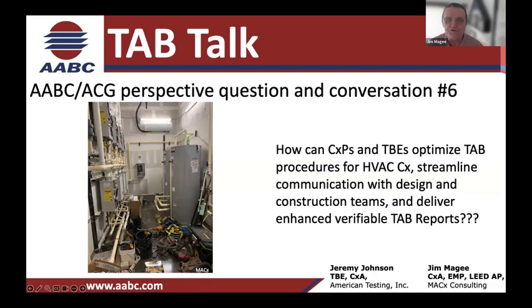So I don't know how you survive any kind of sizable project without some type of software management of what you're doing, both your field report and your status on jobs. Like in data center commissioning, we want a tracking system where things are tagged, both on hardware, physical equipment, as well as in the software in the spreadsheets, and then they're color coded. A lot of times they use green, red, and yellow. You can kind of self-describe what that is.